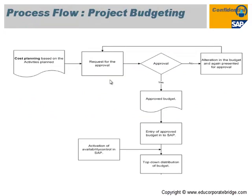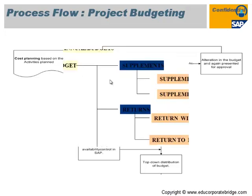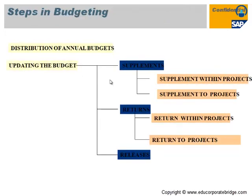The process flow for project budgeting starts with cost planning, followed by requesting approvals. Once approvals are received, the approved budget is entered in the SAP system, then distributed to lower-level WBS elements. Budget distribution can be done top-to-bottom or bottom-to-top depending on business process requirements. Finally, the budget is released across the project.